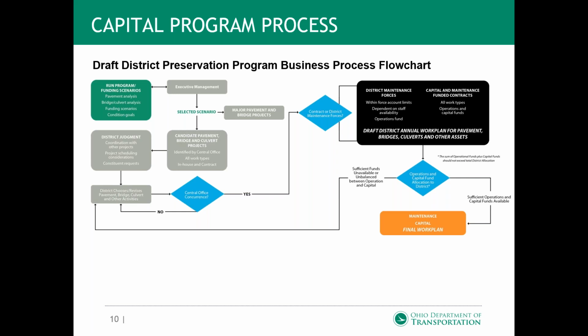If that doesn't work, then they simply communicate to their planning folks in the district that they may need to move a project up. And this going back and forth has been an amazing process and collaboration that has yielded us huge results. At the end of the day, those two plans come together to form one work plan. And that one work plan concept is really where we're seeing our efficiency, that collaboration and things like that.